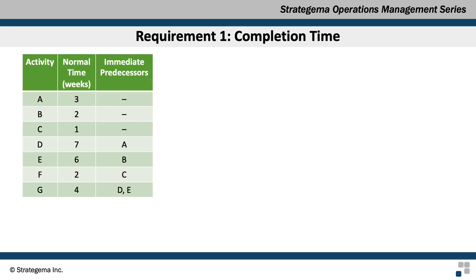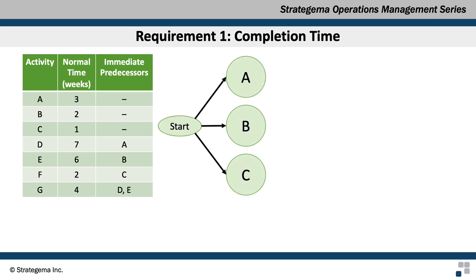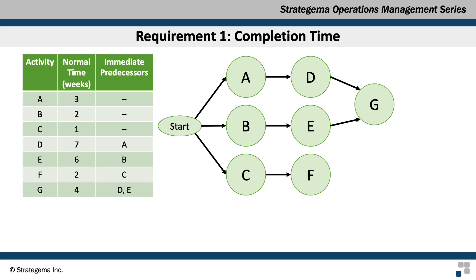The first step in determining the completion time is easiest done by constructing a PERT/CPM diagram. I'll create one using the activity on node (AON) approach. Activities A, B, and C have no immediate predecessors so they can all start at the same time. Activity D is preceded by A, activity E is preceded by B, and activity F is preceded by C. Activity G is preceded by both D and E. The project is complete once activities G and F are completed.